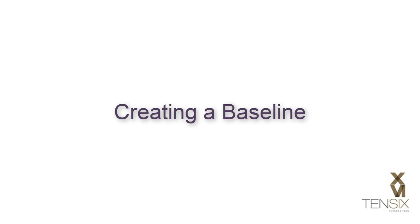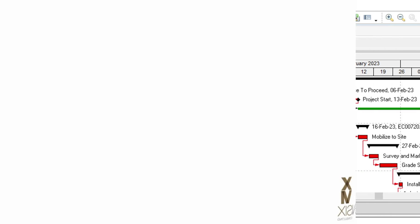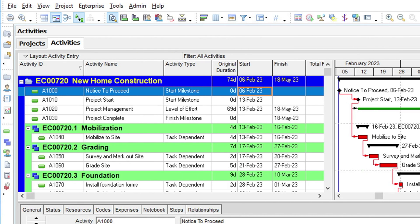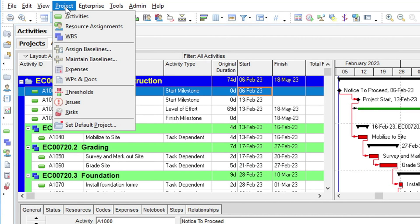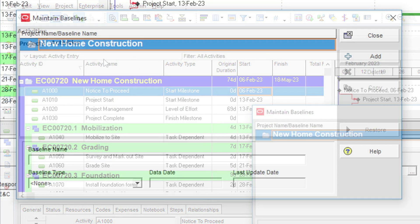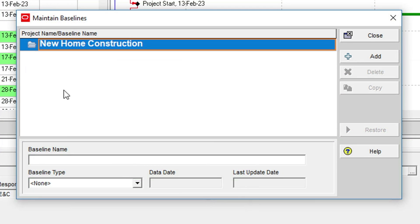To create a baseline in P6, we'll be using the Maintain Baselines option in the Projects menu. When this option is selected, the Maintain Baselines dialogue opens.